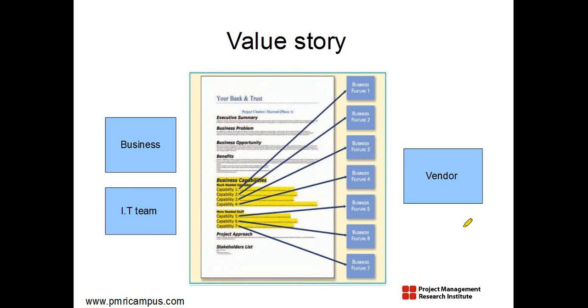So here you may not be able to dump a client immediately after. No, it cannot be used interchangeably because feature-driven doesn't talk about commitment till the customer gets value. It is just delivering features. Okay, so if you can add the value part to it, maybe yes, it can be used interchangeably. Otherwise, the meaning is slightly different. Because if I commit to a feature, I deliver it, acceptance test will run, I collect the money. But when I say value, we are talking about the acceptance test for the value, not for the feature.